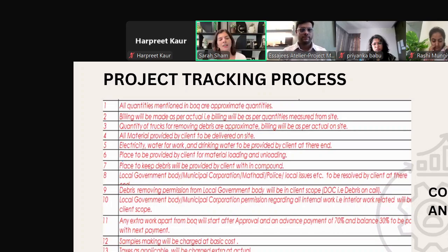Okay, rates for work timings. Okay, we had one scenario in which a contractor couldn't work 10 a.m. to 9 p.m. They were bad work hours, and the site went longer. He directly charged 50 lakhs extra on the project at the end, saying that this is not the work timing that we had. Obviously, had to argue with him and be like, are you mad? We're not going to pay you 50 lakhs for bad work timings. But it happens. So you live and you learn. And yeah, rates quoted valid for 3 months.